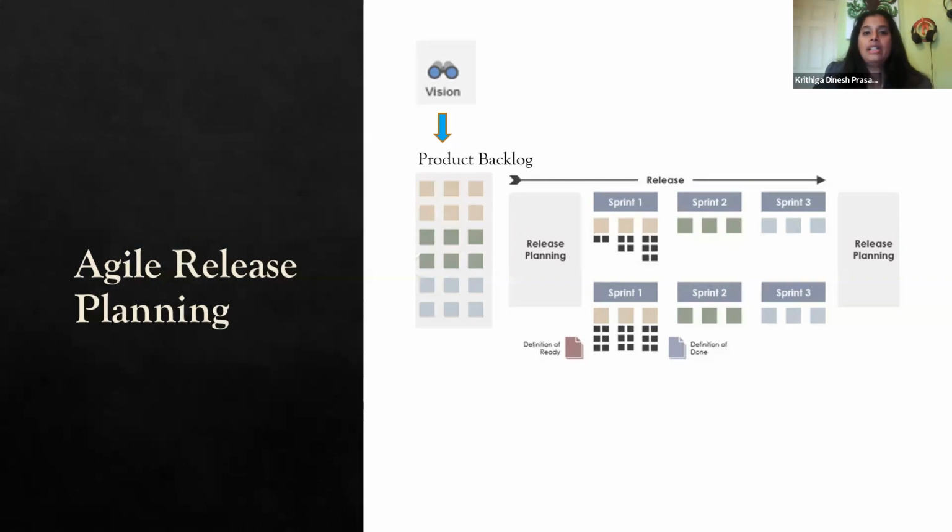And then my product backlog can be built for my first milestone, and a high level release backlog can be built. For example, if I have to deliver a particular level of software, critical flight critical software, or in some terms we call different levels, different colors. So if I have to generate that, that will be my end release, and my intermediate releases will be each of these milestones.